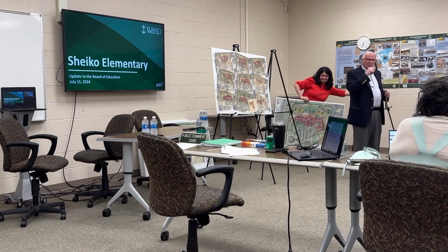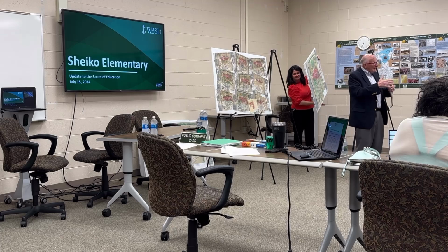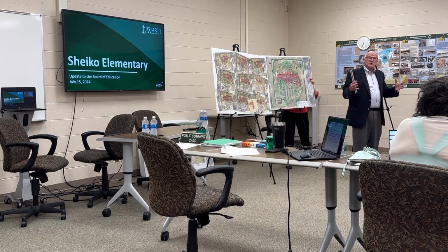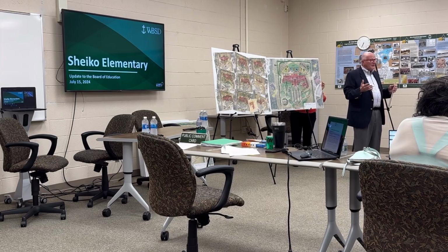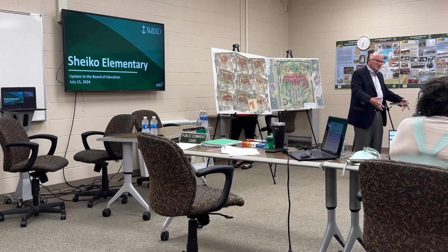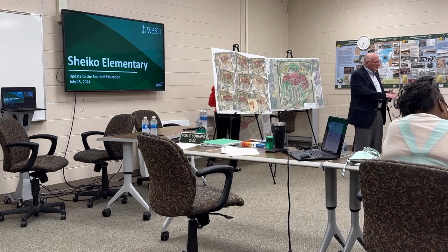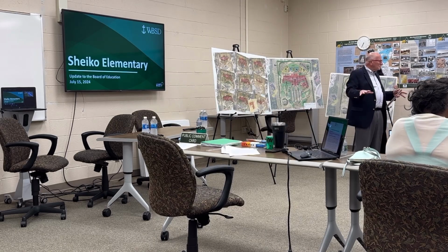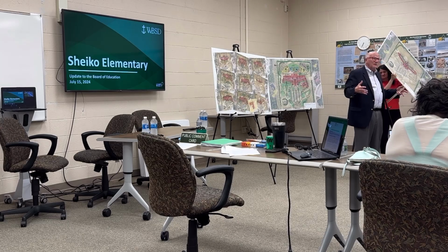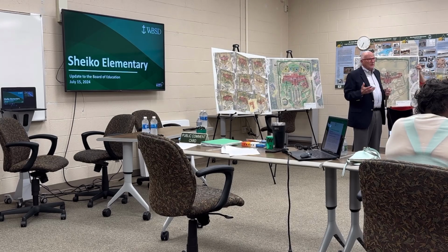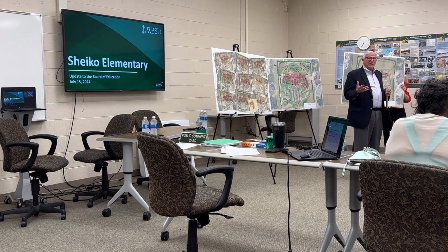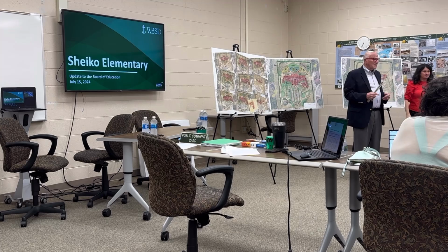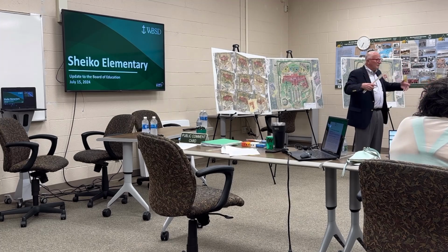From a timing standpoint, we're working on bid packs, and a bid pack is to try to get a jump start on construction. And the first bid pack is going to be foundations. We need to build the foundations and the footprint of the building so that we can start with utilities and all of those kinds of things. We're also working with our engineers on long lead items. A long lead item in particular is like transformers and switchgear that you need to operate the building.